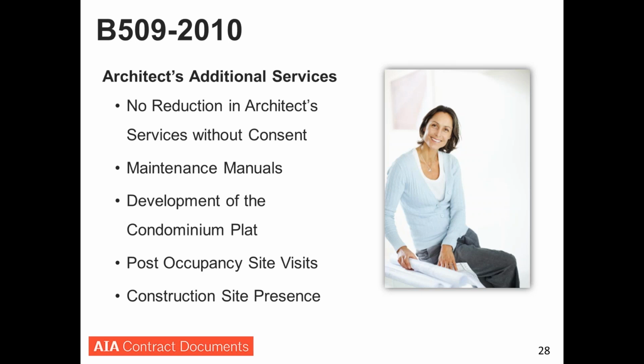Maintenance manuals I'm going to talk about in detail in a second, so I'll skip that one. Susan mentioned the development of the condominium plat, putting into the requirements that the homeowners association has to live with clauses that pertain to how they go about funding their maintenance budget. The things that usually result in these claims, just not having adequate money to fix them, not that they wouldn't fix them, but that nobody wants to pony it up, are built into the homeowners association fees, those kinds of things.